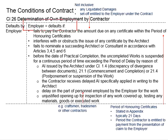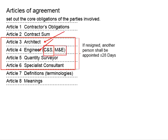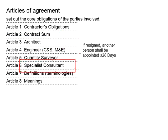Next, the employer fails to nominate a substitute architect or consultant in accordance with Articles 3, 4, 5, and 6. Articles 3, 4, 5, and 6 are related to the architect, civil and structural engineer, mechanical and electrical engineer, quantity surveyor, or specialist consultant. For any project, these professionals are a must.